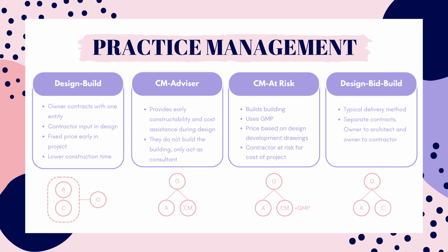And finally, design bid build has a minimum of 2 contracts: owner to architect and owner to contractor. This is your traditional project delivery method where the architect designs the building, the project is bid on by the contractors, and then the contractor builds the project.